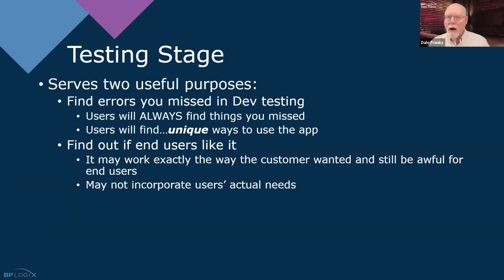As part of their accounting system, I built this very complex, but very detailed and very cool system for doing cost estimates by week for every project. A project for these guys might last anywhere from 8 months to 5 years, and they could put in a weekly time and cost estimate for 5 years. Everybody thought when I was building it that this was going to be great, right up until the time it got into the hands of the people who were supposed to be doing the cost estimates. And they said, no, I'm not doing that.